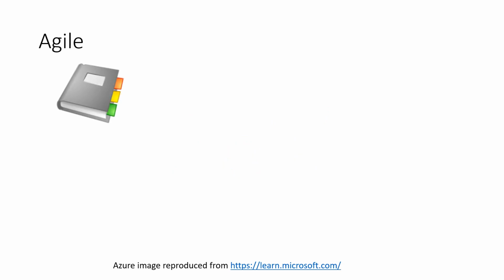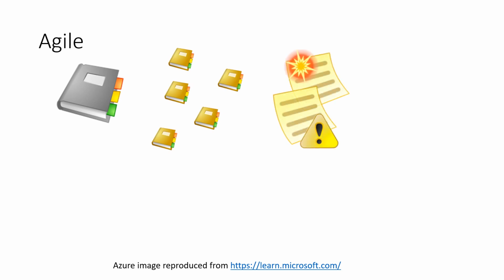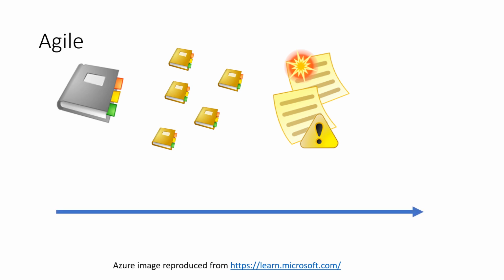An epic is the big picture, which is broken down into smaller stories. A backlog is a list of all the tasks to be done to make a working solution. The backlog consists of features and bugs. A sprint is a fixed time, let's say 2 weeks. Backlog items are allocated to developers at the beginning who commit to completing the task by the end of the sprint. There is a daily scrum led by a scrum master, coach, so everyone knows where the project is up to. Kanban is a way of visually representing each developer's progress.